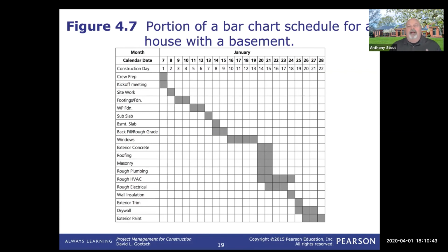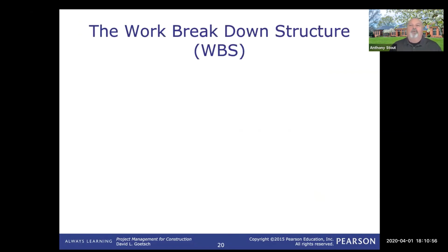If item A shifts to the right and I have them linked in Microsoft Project, then item B is automatically going to shift to the right as long as the link is there. Now, let's talk about a work breakdown structure.